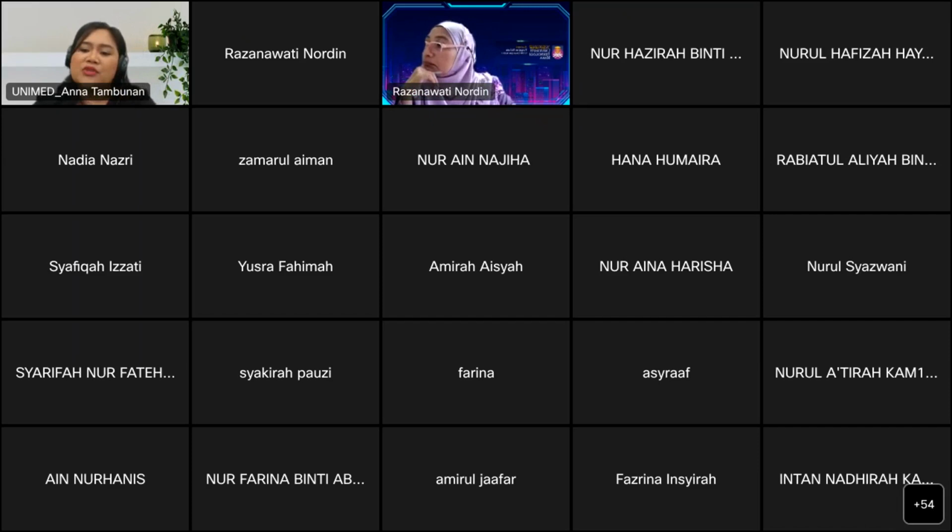Now, what to write in the section to provide a project background. This project background is usually only a one-page section of your project proposal. It will explain the problem that your project will solve. You should explain when the issue started, its current state, and how your project will be the ideal solution, of course. Now, you may write the historic data, as I told you earlier.